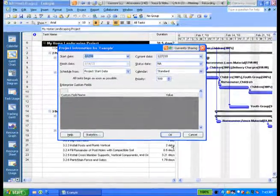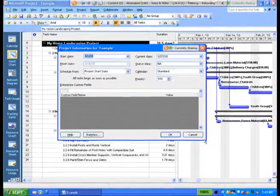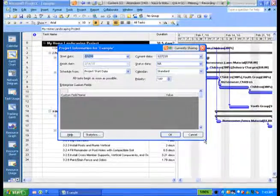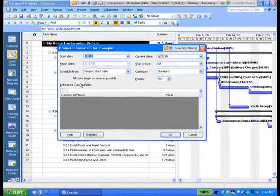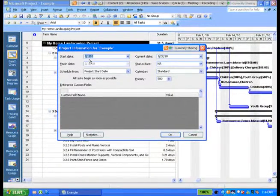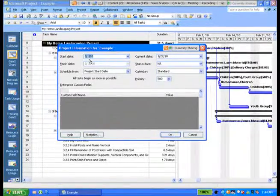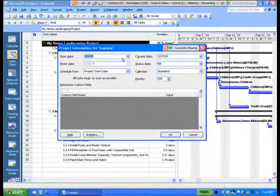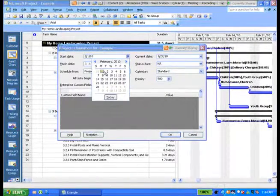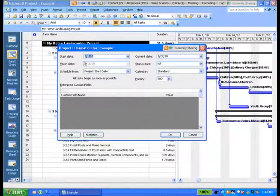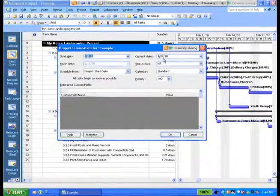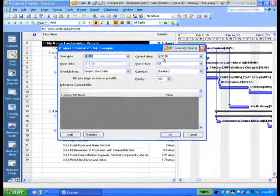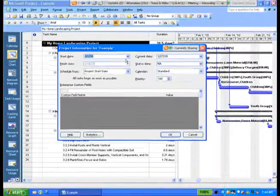The project information dialog box has some incredibly important features and can affect the project dramatically. The start date field is the starting point for project in terms of calculating this project. So we can type a date in, if we know it, or we can type a month in. We can essentially pick from a dropdown. Now, I selected February 1st for the start of this project, even though the current date is the 27th of January.